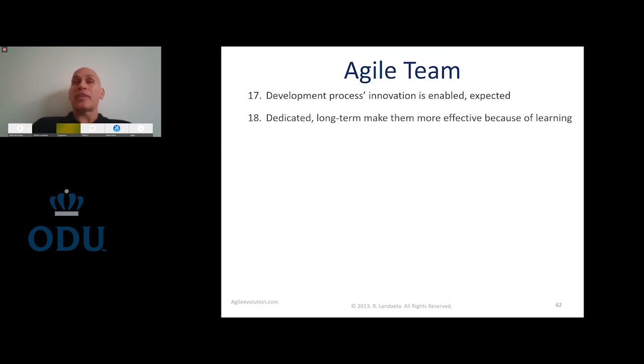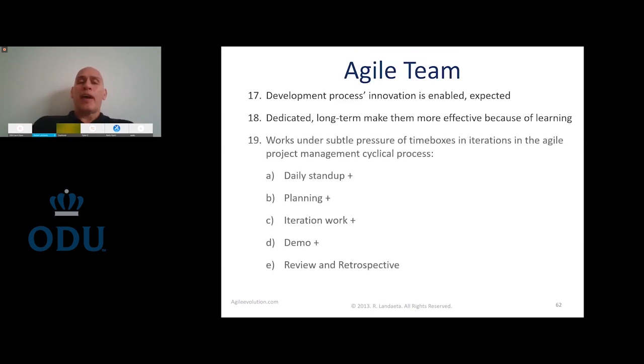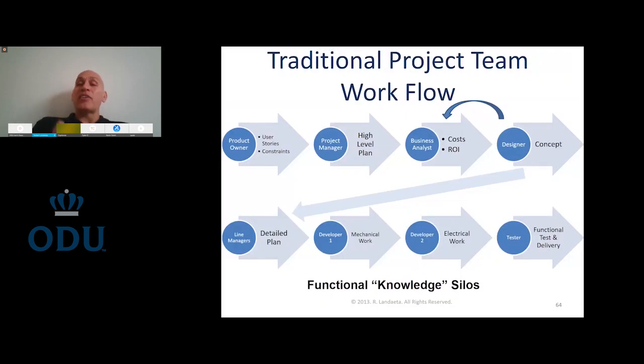Dedicated, hopefully, in this team for a long time so that they learn and develop how to work together, which is important in innovation. And goes through this process of daily meetings, daily checks on where we are at, planning where we're going in this iteration, doing the work, very important, demo and validating, and then reviewing and collecting understanding, and go back to this cycle of iterations that can last between a week or 2 weeks, 3 weeks, depending on the time.